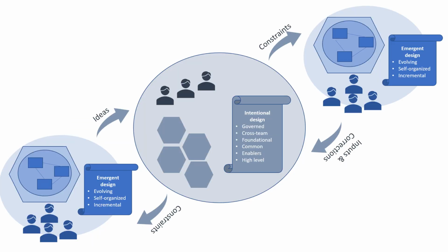If we have a distributed system that has components such as microservices, one team manages one component and teams are agile and cross-functional. They deliver value through iterative development, and these nimble teams discover and extend the architecture only as necessary to implement and validate the next increment of the functionality. It's an emergent design. In a sprint, it is only that much design work that is required for the sprint, and mostly the development team is capable of doing it.